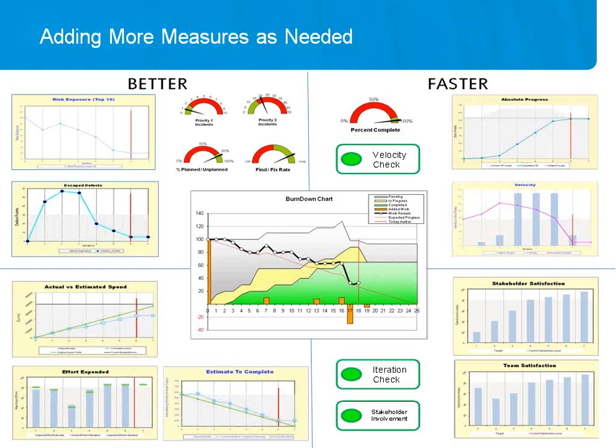The bottom area, the happier, is quite an interesting one. If I'm introducing agile and iterative to projects, I like to measure whether the stakeholders are happy with this and whether the team are happy with this. It's very easy to come up with some tools and questions you can use in the retrospectives and at the demonstrations to find out how happy people are. A very simple way of getting a team satisfaction measure is, every retrospective, something we do is you can have a number of different smiley faces from a very sad one to a happy one. They just register their happiness.